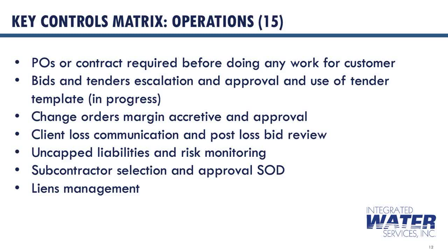There is a clearly defined process for bids and tenders that outlines the templates to be used as well as the escalation for approval, before making any commitment to a customer. All change orders need to be approved and the margin should be above the main project's margin. If a customer or a bid is lost, there is a process in place to communicate and review it, to analyze what went wrong and how to improve for future opportunities.